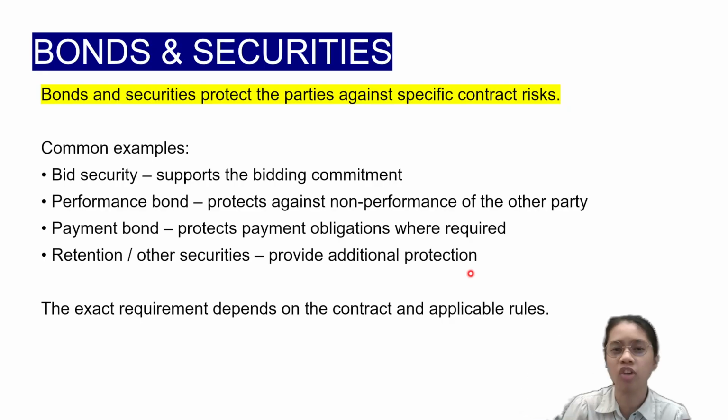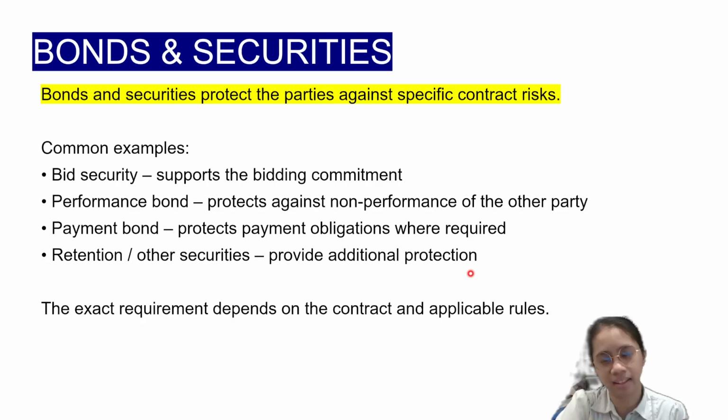That's part of the contract, because you will be having the cost, the duration, the details, the scope of work. But if in case that the contractor didn't comply with the details in the contract, there is still a performance bond that will pay the client for the misperformance of the contractor.